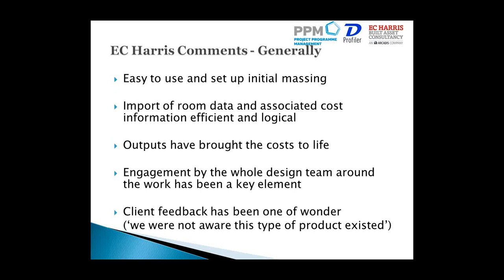Andrew comments: so it's best used for early stages of RIBA Plan of Work 2013 before moving on to a more detailed model and cost exercise. Yes, I think that's a very good description. You can put more detailed costing into it, but you have to look at the laborious side of creating those details — you've got to draw the line where the conceptual process ends and the more detailed cost estimate takes over, and then use that with the likes of CostX and CostOS.